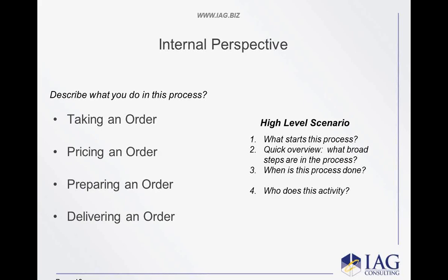See, what you're doing is, at the highest level, identifying the basic elements of the business that are being covered, who needs to be in the room, how many of these different business processes there are, and how complicated they are. So that gives you a very good idea of how much size or how much resource is going to be required to figure out the rest of this.